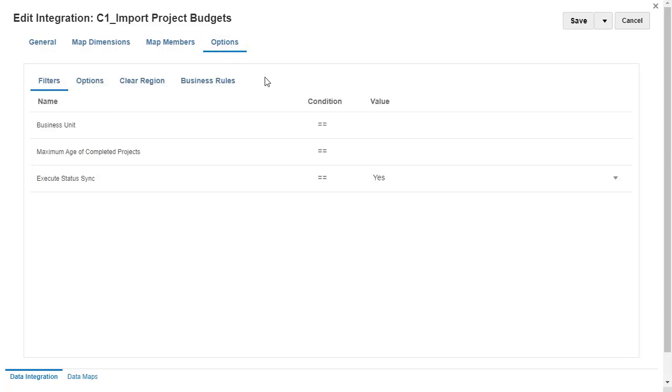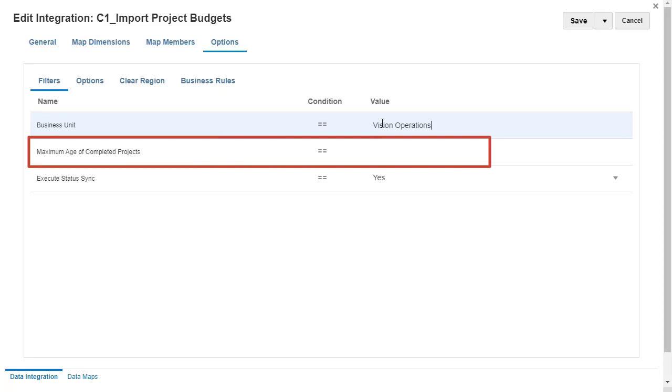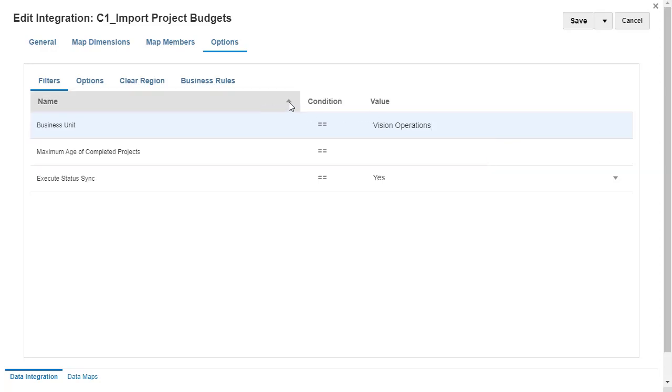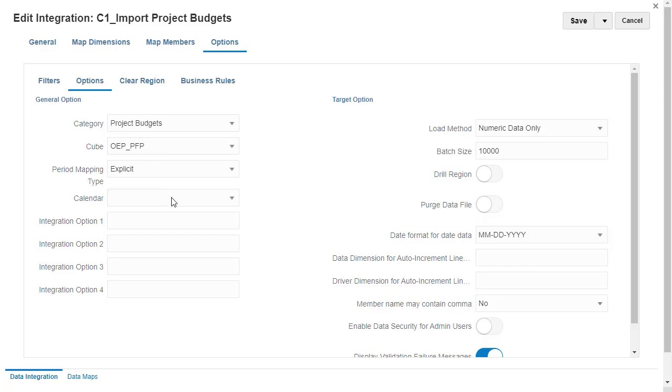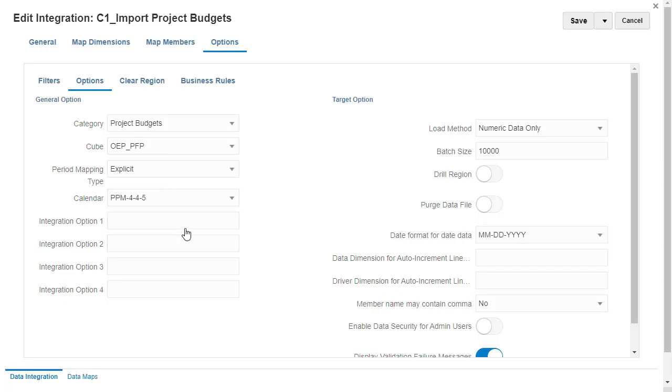In Filters, set the Business Unit filter value for this integration job. Setting a maximum age of completed projects lets you filter projects completed within a number of days. In General Options, set the period mapping type to Explicit and select the period you define in Source Mapping. I'll save my changes.